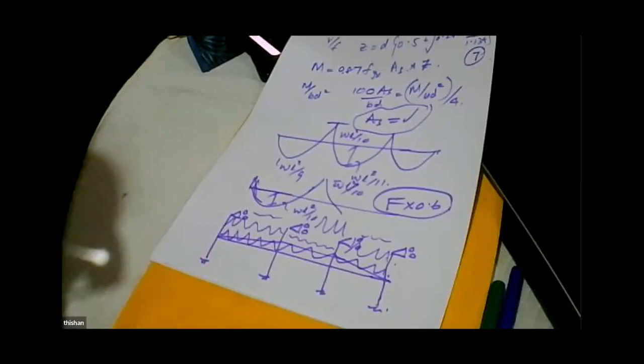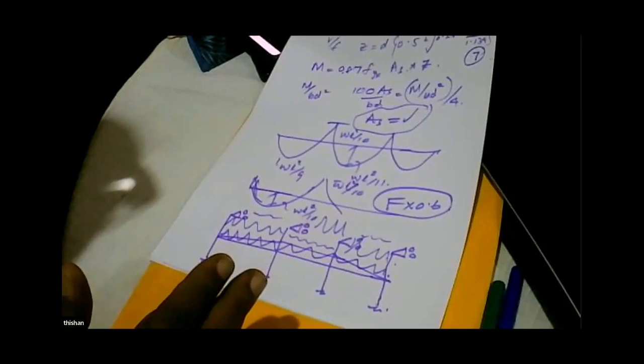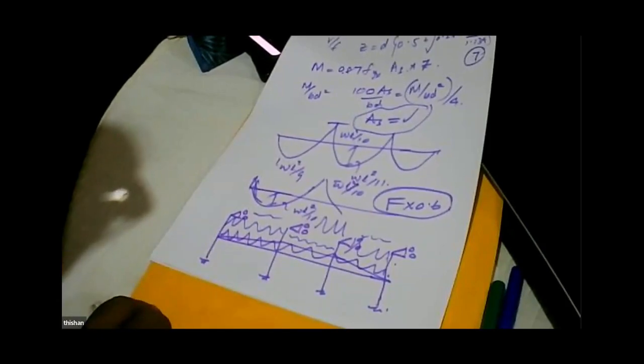But if you are doing this, you might charge about 10% or 20%. On a 2,000 million structure, you are going to save 40%, so you are saving 800 million. Even if you charge 10%, your charge will be 80 million. So even if you pay that engineer 40 million, it's worth it, because you are going to get 40 million anyway. And the client is going to save how much? 800.